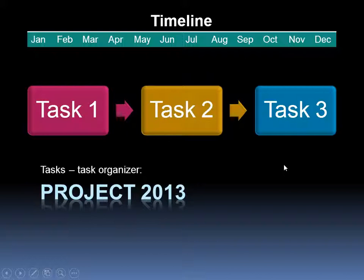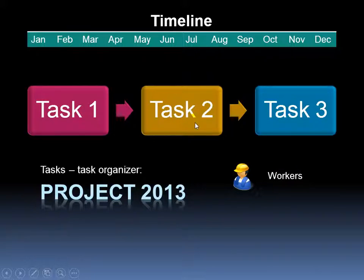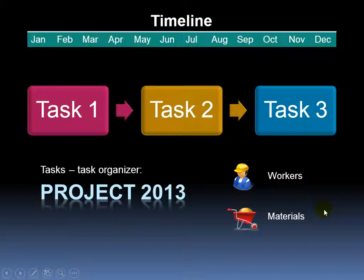Each task is going to require some resources, and there are three types of resources. First, you have your workers — who's going to work on task 1, task 2, and so on. For example, task 2, writing the book, you can assign writers. The next resource would be materials: do they need a ream of paper to write the book on, or are they going to use a word processing program like Word 2013?